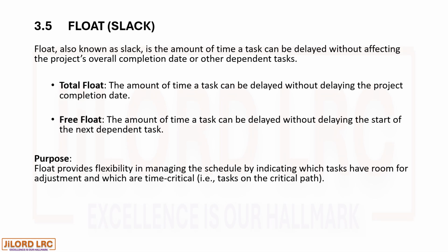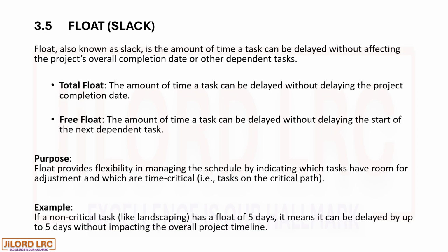Purpose. Float provides flexibility in managing the schedule by indicating which tasks have room for adjustment and which are time critical, that is, tasks on the critical path. For example, if a non-critical task like landscaping has a float of 5 days, it means it can be delayed by up to 5 days without impacting the overall project timeline.